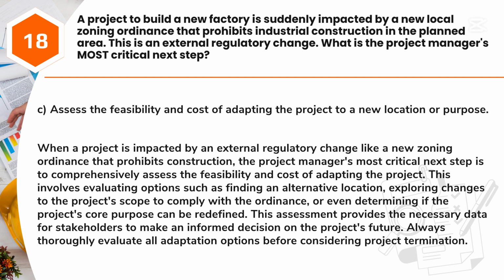This involves evaluating options such as finding an alternative location, exploring changes to the project's scope to comply with the ordinance, or even determining if the project's core purpose can be redefined. This assessment provides the necessary data for stakeholders to make an informed decision on the project's future. Always thoroughly evaluate all adaptation options before considering project termination.